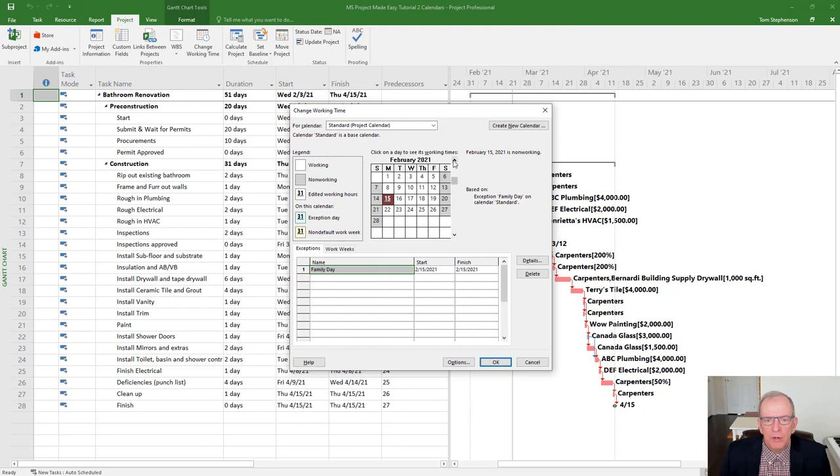If you had another holiday that you wanted to put in, let's say a holiday like Good Friday. I'm not sure what it is this year, but let's say it's April 9th as an example. I can click on April 9th and I can type in Good Friday as an example. All right, and then once I click in Good Friday, I just click over here and it will put up that holiday. And you'll see it hatched, and it usually gives you a legend on the side where you can review it and you can see it's hatched.